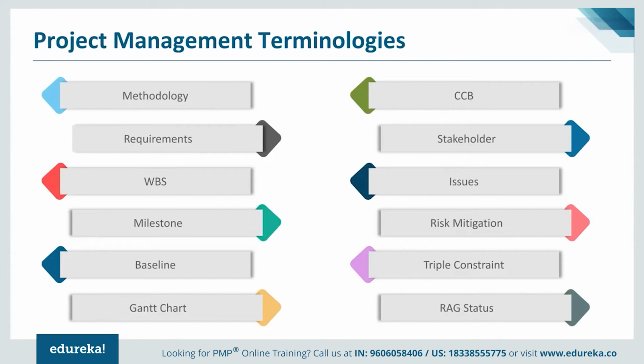Then all the stakeholders come together and ascertain, if we implement this change at that stage, what will be the impact of that change on the schedule of the project, the budget of the project, the overall risk, whether risk will go up, resources, etc. Once they understand the impact of that change, they decide whether to approve or reject that change.